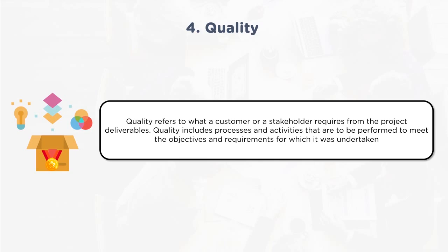So for that there should be a layer of quality management where auditing or control activities are initiated periodically so that any deviations can be seen easily. And remember, a project manager cannot become part of quality management. Like, a project manager cannot audit. The project manager should have a team or take the help of a team who is able to do it. Mostly, someone who is not part of the project is always better.